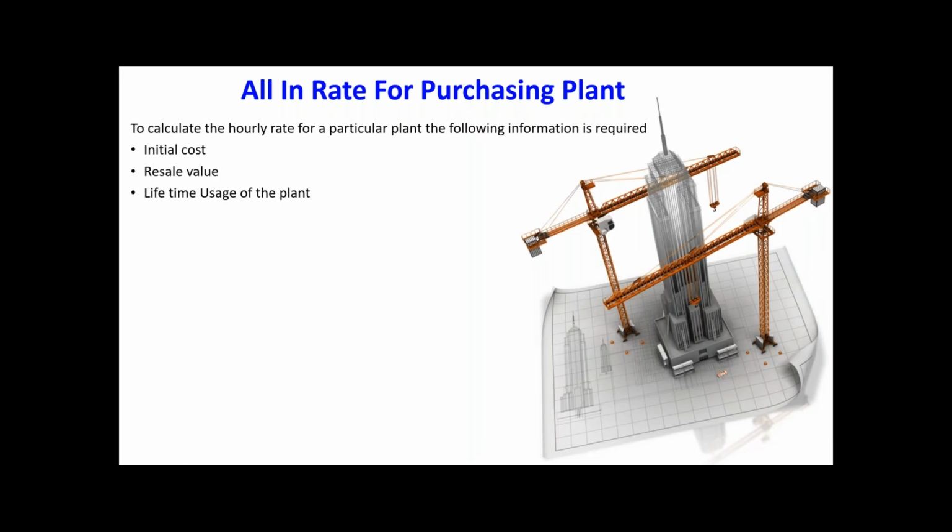So therefore, if you are going for purchasing a vehicle or any plant, you have to think about so many factors. One of the factors is time. Are you going to use it for a short time or a long time? Based on that factor, we can decide whether to purchase or rent.